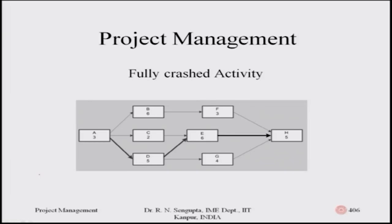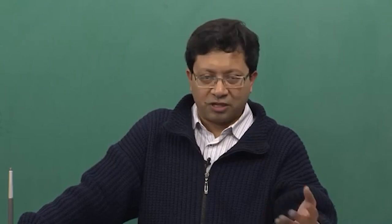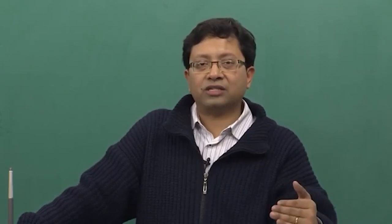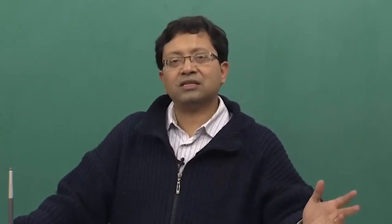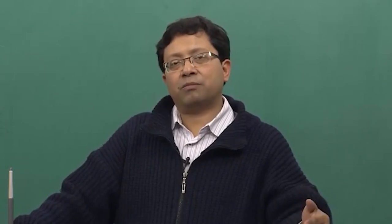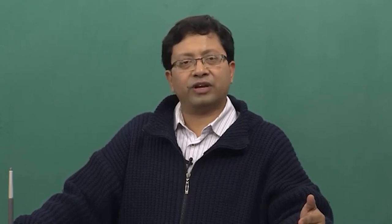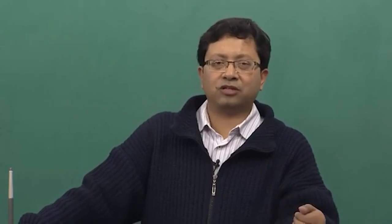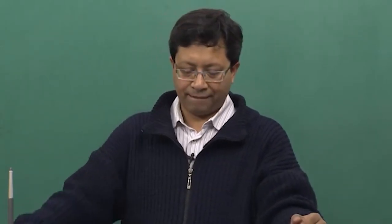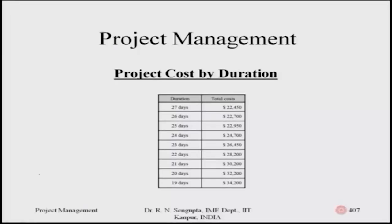The fully crashed activities are given as stated. The only difference from the initial problem is that the first used activity-on-arc notation and this one uses activity-on-node — that makes little practical difference. The key conceptual difference is that this problem introduces variable costs alongside fixed costs. The project duration table runs from twenty-seven days down to nineteen days. Using forward and backward pass methods, total slack, and free slack concepts — which I urge students to solve themselves in an Excel sheet before resuming — the total cost at twenty-seven days is twenty-two thousand four hundred fifty, increasing to thirty-four thousand two hundred at nineteen days.